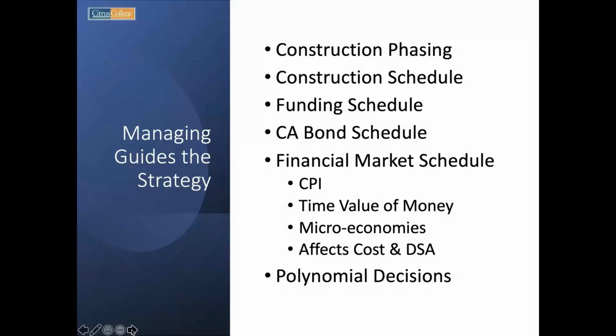If they look at the building as a replacement and it exceeds a certain percentage, say you're going to modernize it, if it costs too much, especially in a time where the CPI and cost escalation is great and the time value of money is diminishing, that means don't even undertake doing a modernization, because DSA is not going to let you do that anyway because it exceeds their cost.